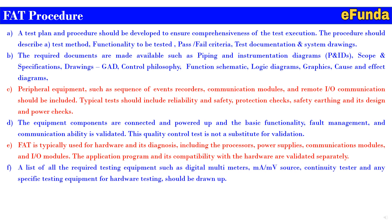The application program and its compatibility with the hardware are validated separately. The list of all required testing equipment — such as a digital multimeter, milliamp/millivolt source, continuity tester and other specific testing equipment for hardware testing — should be drawn up and made available on the FAT shop floor. This is how we have tried to cover the FAT along with their details, testing, and the purpose of the testing procedures.